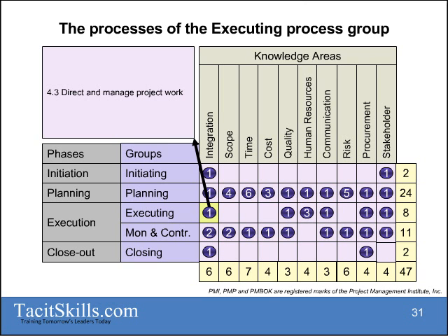When I look at my quality, you'll see that I'm going to do quality assurance. Now, what is quality assurance? The quality assurance says that those standards that I've agreed upon when I did my quality planning, quality assurance asks the question, will I be able to meet the standards? So it's all to do with the processes, the capability, and the people.